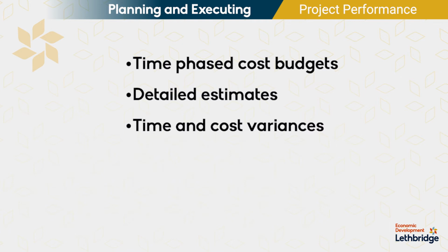Earned value, however, is a little different. Earned value is based on the actual work completed. If you look at the above, and although you are 6 months through that project, you look at the work that's completed and you only feel that you're 40% complete, then your earned value would actually be $40,000. So planned value is based on time, earned value is based on the work completed. Actual costs are the actual cost you have spent to that date, regardless of the work done.